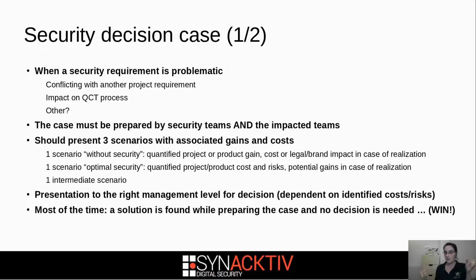The product or the project gain should be quantified. It's going to cost that much money less. It's going to gain us this amount of time, for example. It's going to allow us this kind of function. It should be written. Okay, and the security team should highlight the cost, or legal or brand impact, in case of the risk realization, if there is actually an attack later.